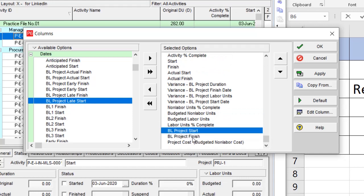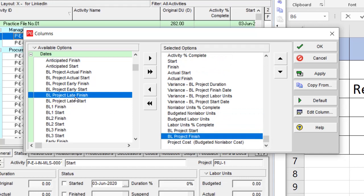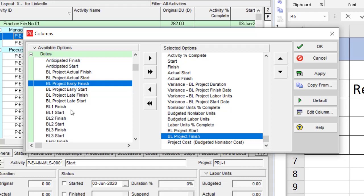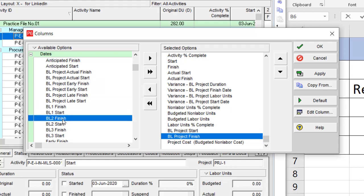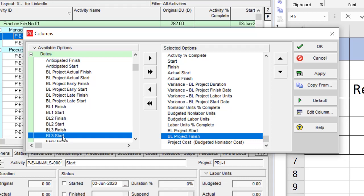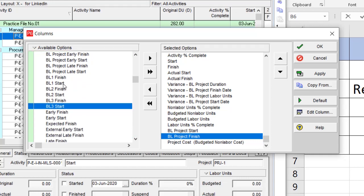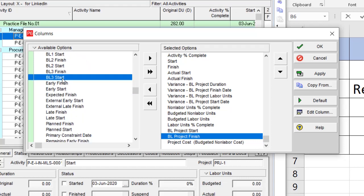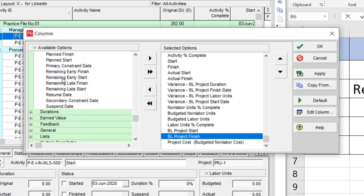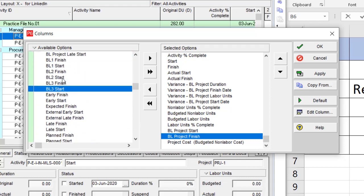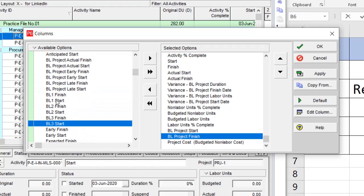I have baseline start and baseline finish over here, but I have late and early also. But for baseline one, baseline two, and baseline three, I only have baseline finish and baseline start. That is a little bit different from the project baseline and the other baselines.